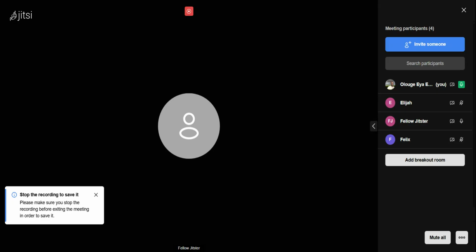So I was explaining that when you add the tasks, according to my timeline, when you see an arrow dropping down like this, it indicates that this task has the one up above it, with this arrow pointing to it, as its predecessor.